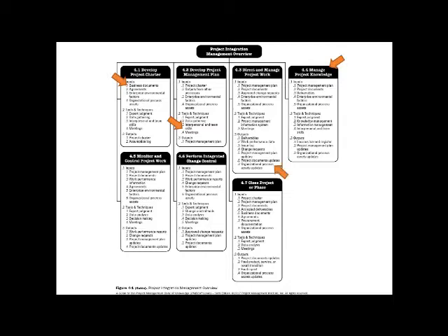Organizational process asset updates does not come up as an output as often as it did in the previous PMBOK. You will see it only come up in 2 execution processes. Previously we talked about lessons learned as being an output, and that was covered by organizational process asset updates. But here, organizational process asset updates, i.e. stuff that goes into the company, happens through these integration knowledge areas: direct and manage project work, and manage project knowledge.